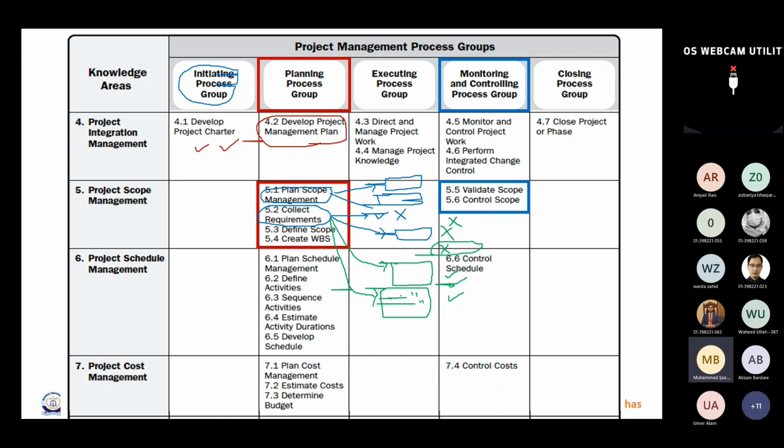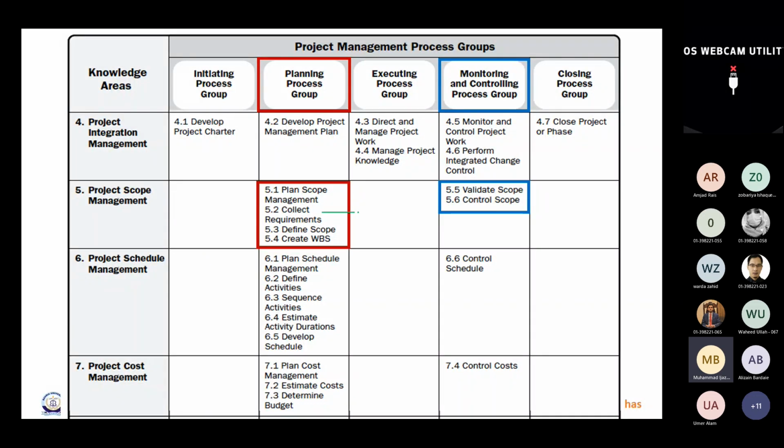If you are a project manager and confused about which objective is more important, consult your charter and the business case. If you are still confused, ask the sponsor which is more important. Every stakeholder may give you a preference of their own choice, but it is you as the project manager who has to set the priority of each requirement.